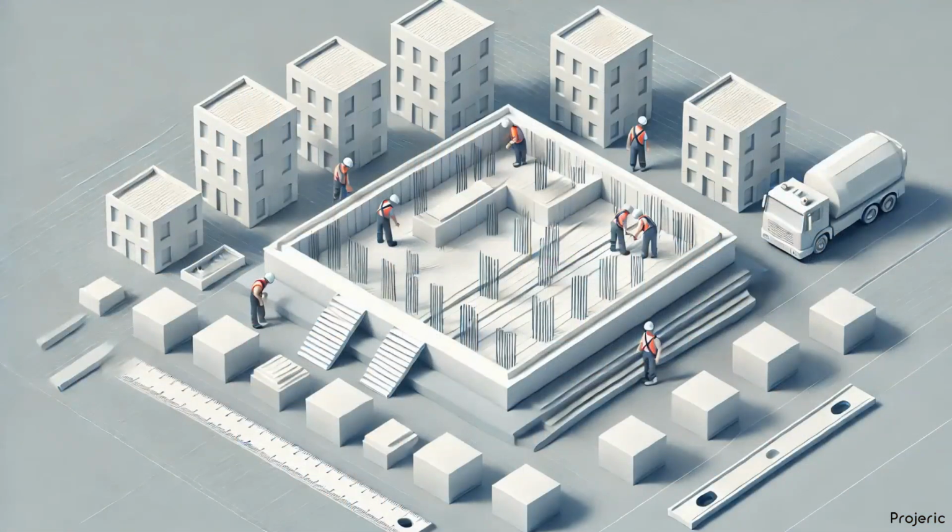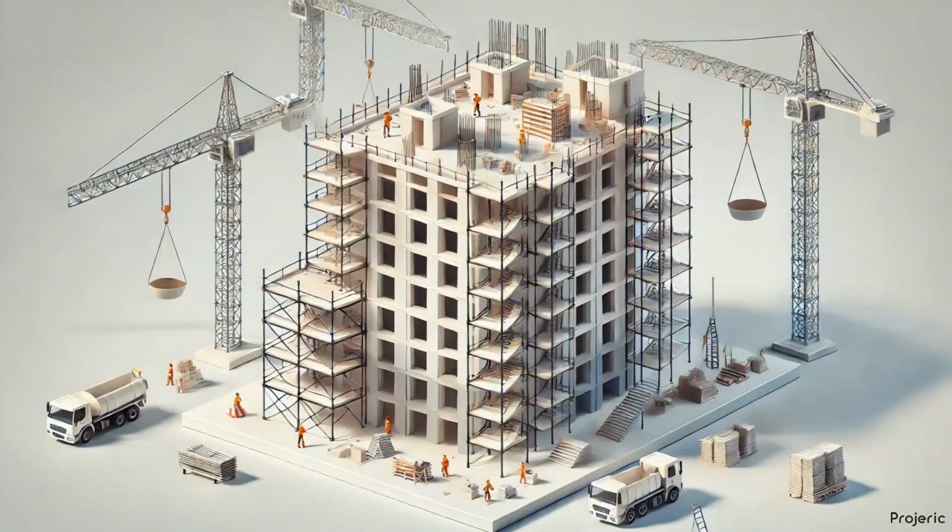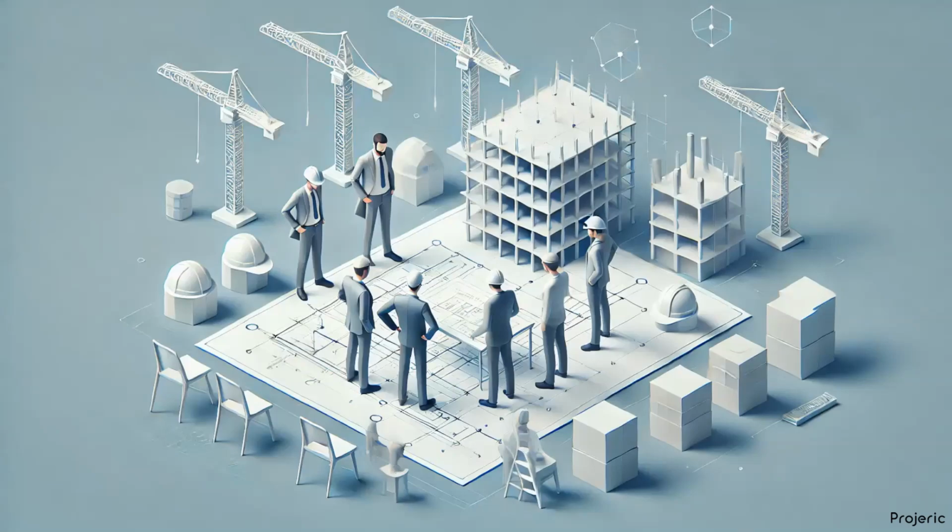For example, a predictive approach would be very suitable for a building construction project, as the building needs to be designed in detail before construction. Imagine designing and constructing only the first 2 floors of a building, and then deciding to add additional floors. In any building project, every building element is interconnected to the point that the building must be designed as a whole. The foundation of the building is designed according to the load it will carry, meaning that all the floors and the loads need to be determined right from the first phase of the project. For that reason, project scope and requirements must be determined before construction starts.